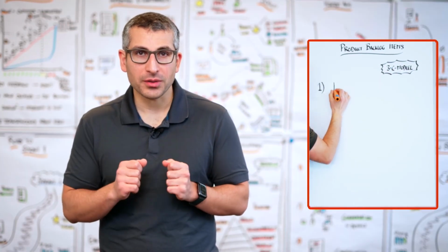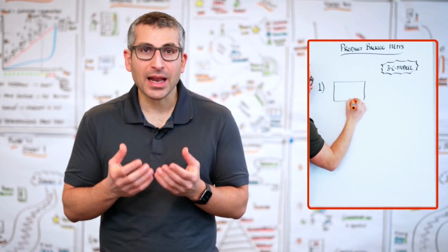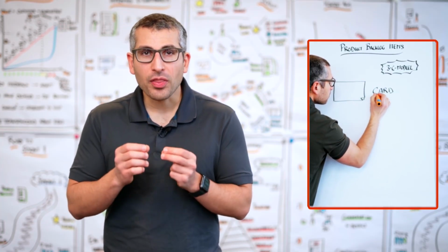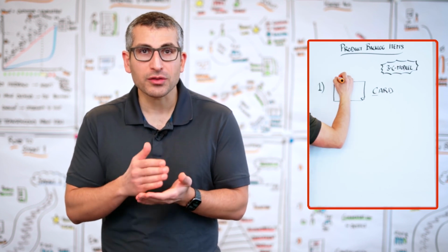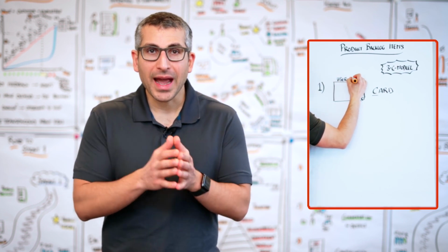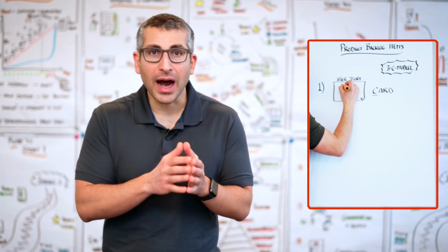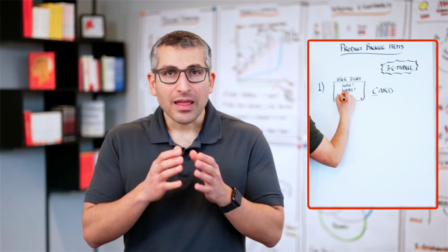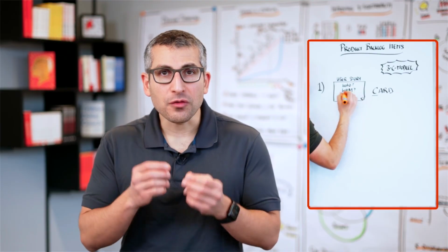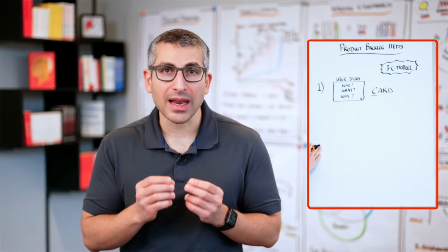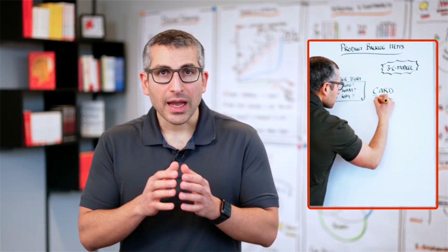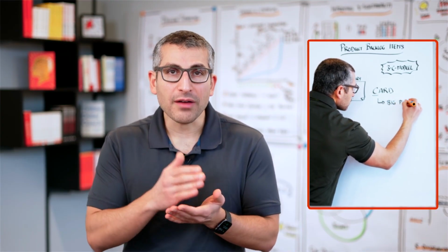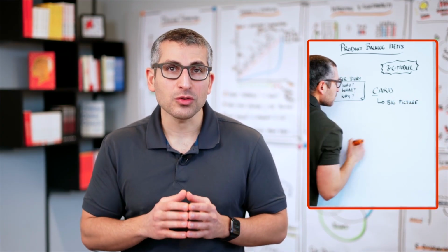This is our card. And the card is an analogy for a bigger post-it note or for an index card. And on that card, you usually start out writing a user story. As a, who am I, I want, what do I want, so that, why do I want it? That user story helps us to focus on the most essential elements of a requirement. And when we do that, we also deliver the big picture to everyone who reads that specific user story.